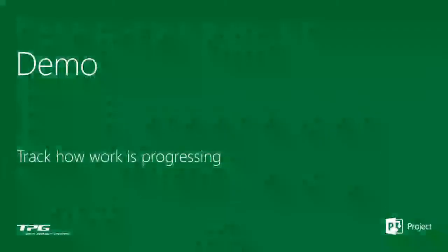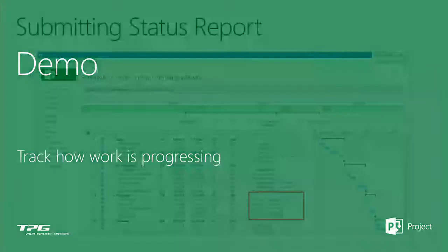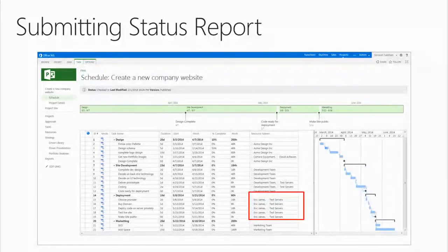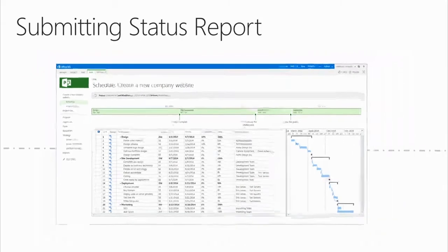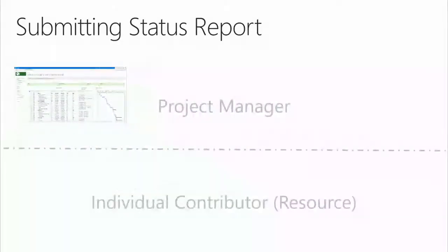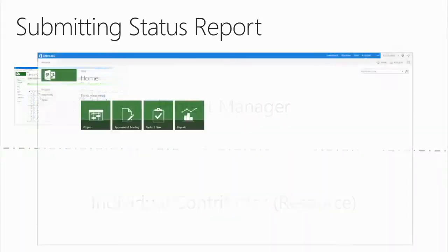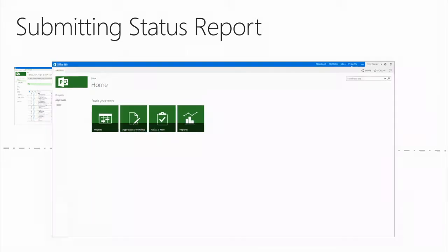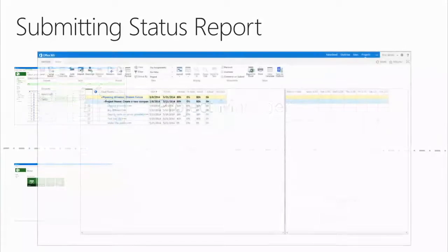The way they do that, this one I have screenshots, so I don't have to rely on the desktop browser. The project manager created the assignments, assigned a bunch of stuff to Eric. He's going to publish the project, and as soon as he publishes it, the tasks start showing up on Eric's homepage. So when Eric logs into the server, he sees on his main page that he has 5 new tasks assigned to him, and by clicking that, he can go to his status page.